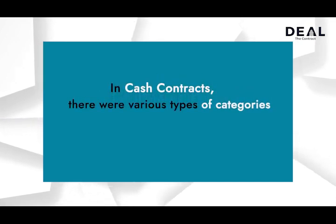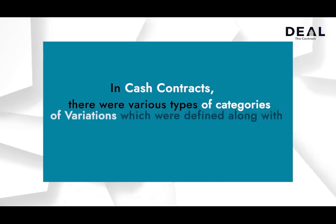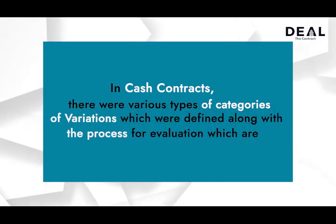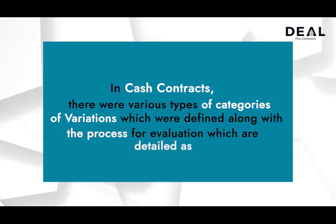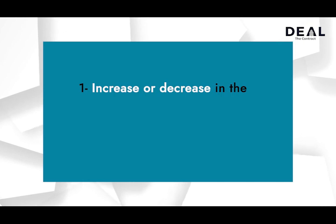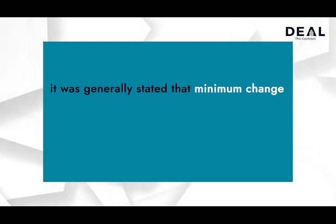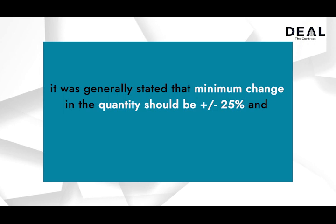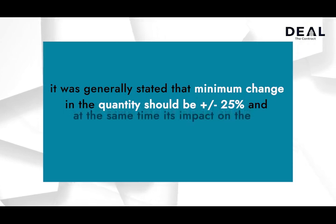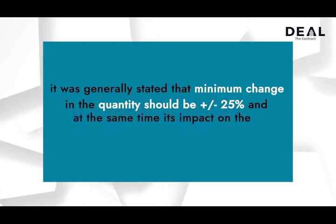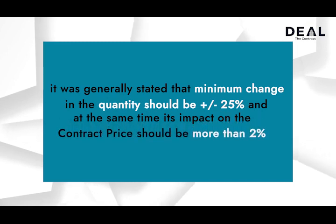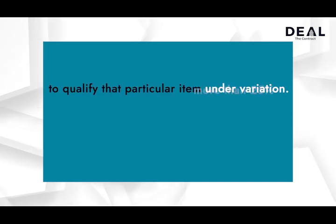In cash contracts there were various types of categories of variations which were defined along with the process for evaluation. 1. Increase or decrease in the BOQ quantity of one particular item. It was generally stated that the minimum change in quantity should be plus or minus 25 percent and at the same time its impact on the contract price should be more than 2 percent to qualify that particular item under variation.